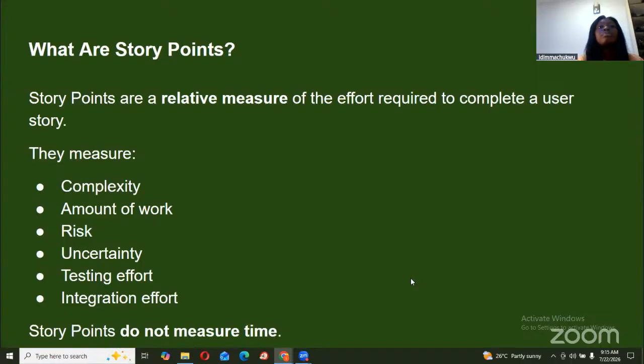But bringing it back to story point estimation and efforts in estimating story points, we are looking at just the active work alone. Now, this active work is not just the physical work that needs to be done. Let's say, for example, you have a user story that the user just wants to be able to reset password. You're not just calculating the time, the effort the developer is going to put in to type the code. What about the time, the effort they are going to put in to actually think it through? How am I going to design this? How am I going to implement this? That is effort for you.